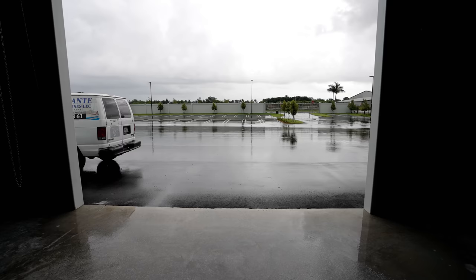A couple of things: after that, sea trial doesn't necessarily mean that it's ready for the boat owner to see the boat yet. Those initial sea trials that we do are where we're trying to put 10 hours on. We're trying to get to the point where this boat is turnkey, with no issues. I have found literally anything that would bother you, spending the amount of money that our customers are spending on these boats. So that when you do receive your boat, it's literally push a button, fire it up, untie, and go have fun.